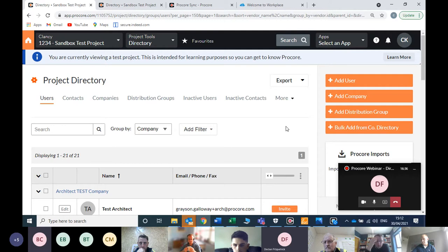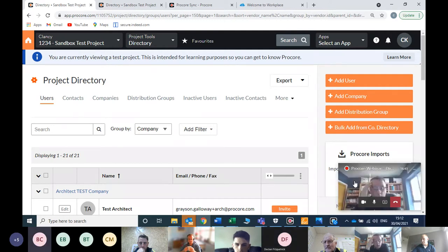Can I ask a question, lads, Brian? Just because it was actually going around my head about that Excel directory. I suppose what I normally do is when a job is started, like the first bit of direction in the Excel document, I set it up, like say the design team and all that, and then on the roles and responsibilities, it's handed over then to the QS, who as the subcontractors have been appointed, add in the names and emails of all the subcontractors being appointed.